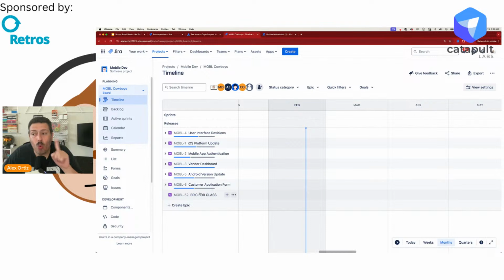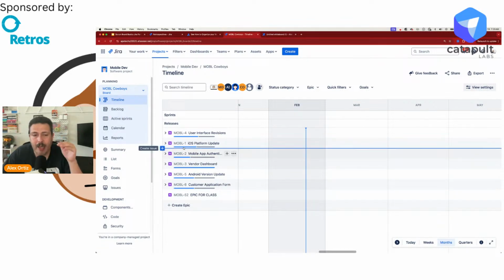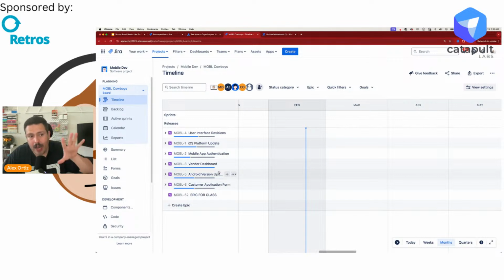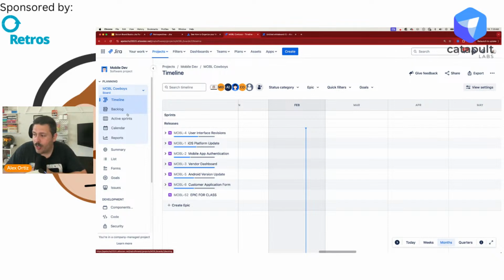But keep in mind that the work, the tasking, the assignment of this epic to actually drive the delivery of that epic will not happen in Jira. At least it won't happen in your backlog. It's not going to happen in a sprint. So you want to go into defining your epic with that in mind, that epics by nature, by the design of Jira, especially if you're in a Scrum board, these rules do not really apply if you're on a Kanban board. But since this is Jira for Scrum Masters, we're going to assume that we're inside of a Scrum project.